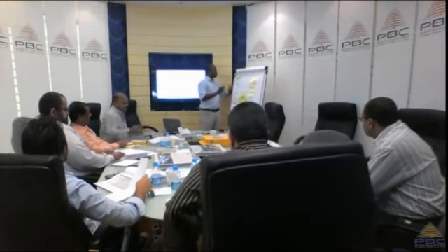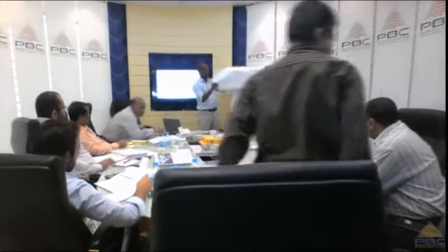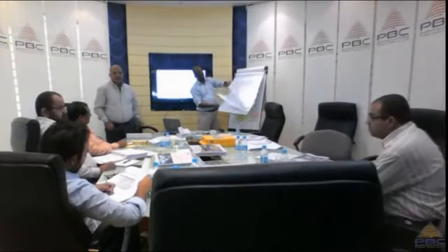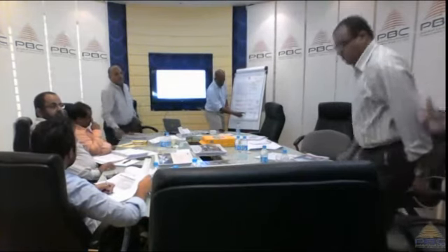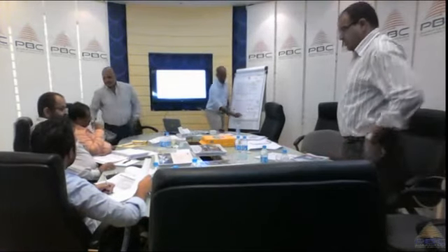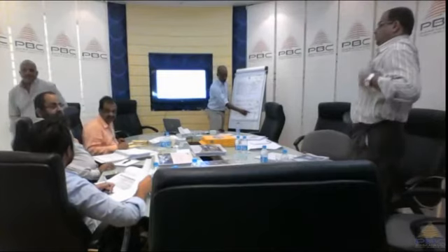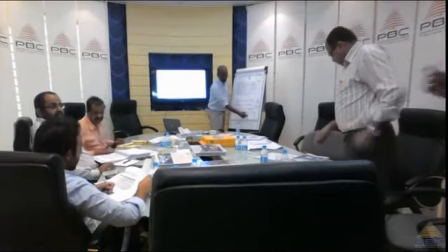CPI and SPI are the same as CV and SV, but instead of taking the difference we divide. So SPI is EV over PV, as a percentage. CPI is EV divided by AC.